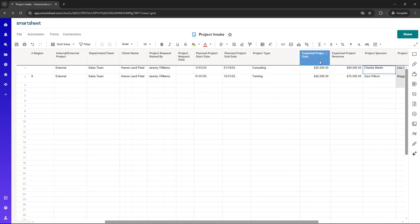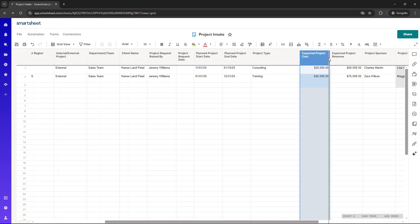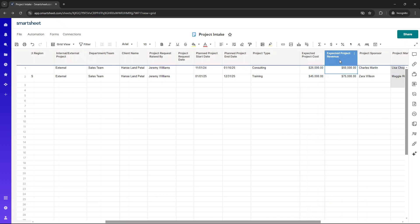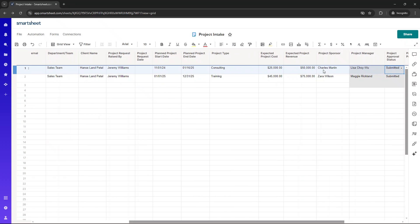We've then got the expected project costs, and I've put on some currency format on these. So yeah, how much does the project expect to cost? And what's the revenue expected from it? So here we can get a quick understanding as to whether the project is viable or even worth running altogether. That can just help us to prioritize projects as well, because we can focus on projects that have the highest return.